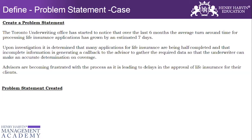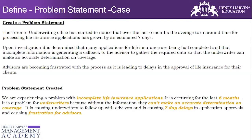Here is how the problem statement has been created: 'We are experiencing a problem with incomplete life insurance applications. It is occurring for the last six months. It is a problem for underwriters because without the information, they can't make an accurate determination on coverage. It is causing underwriters to follow up with advisors, causing seven-day delays in application approvals and causing frustration.' This problem statement has a clear 4W1H presence and calls out the impact of the problem. We should always look for problem statements that have the presence of 4W1H.